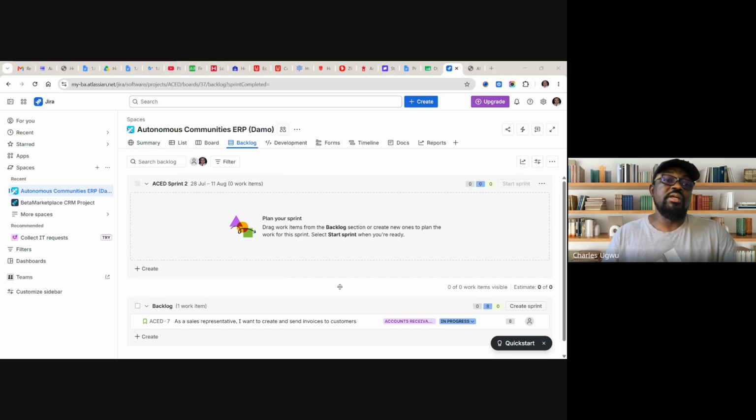Demo and retrospective is not something you use these things for; it's just a meeting. So you have the meeting, and after the retrospective, you come back again. You do not rest. The rule is that another sprint starts the next day after the last sprint finishes.